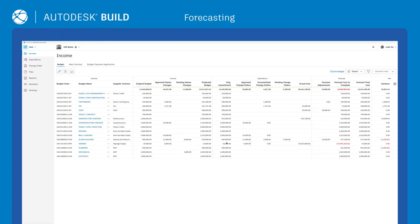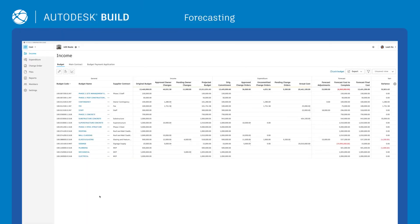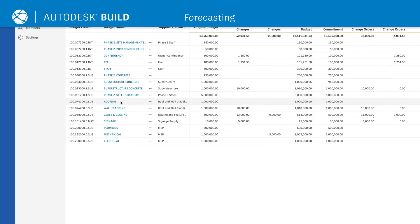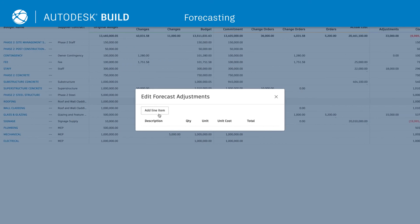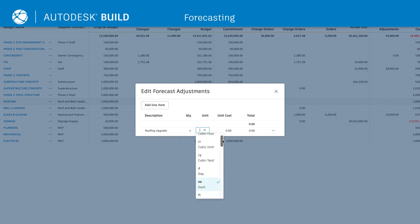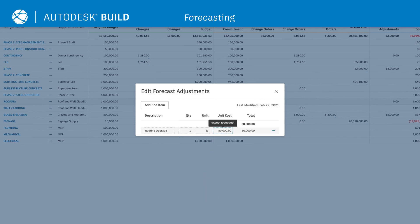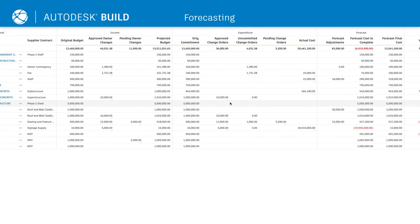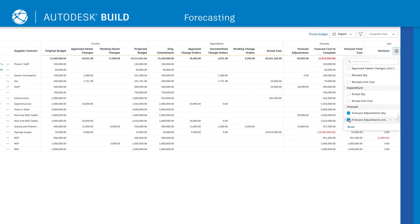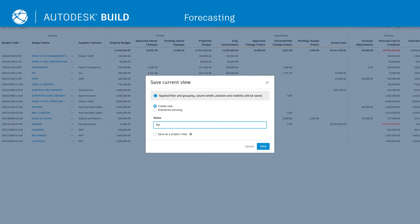Cost also includes a forecasting functionality, allowing teams to make forecast adjustments and view final forecasted costs and variances. Teams can create custom forecasts by leveraging planned and actual cost data, generating custom calculated columns, and saving personalized views.